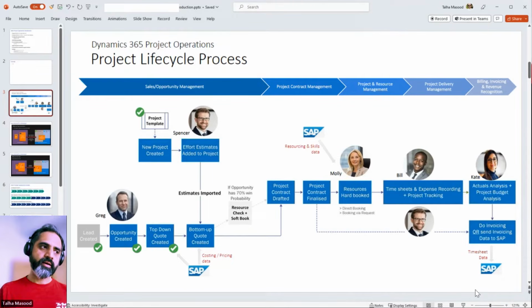Now somebody is looking at the financial health of the project, so they need to be able to know that, okay, 80K worth of effort was invested. Now 80K worth of effort was invoiced. At the moment, 0K has been paid because nobody has paid us, or maybe after 2 or 3 days, whenever the payment comes through, it will be 80K worth of payments which have come in, and then it will also tell us how many dollars are remaining as well. So I'm just trying to make it easy for you to understand.